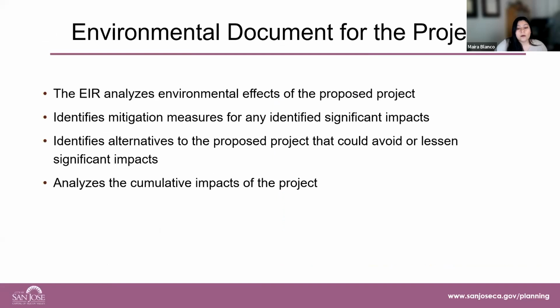The scope of the EIR includes a conditional use permit to allow demolition of existing commercial buildings and the removal of 69 trees for the construction of an approximately 166,058 square foot wholesale Costco retail center, including a tire center and associated parking and landscaping within an existing 19.8 gross acre shopping center known as the Westgate West Shopping Center. The project also includes a request for the sale of a full range of alcoholic beverages.